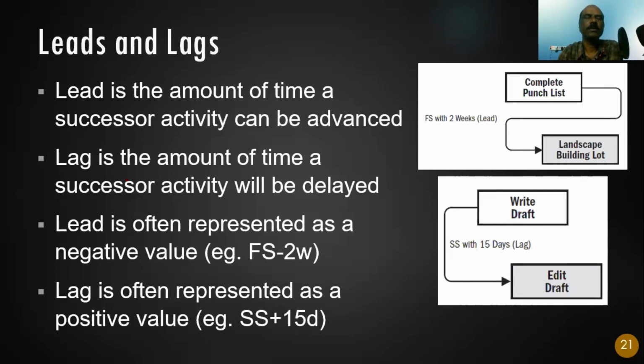That is lag. Sometimes I might say that finish construction, and from the finish of construction, I need 45 days to submit the as-built drawings. That is again lag, 45 days lag. Or maybe you might be doing a concrete slab, concrete is done, and then I want to wait for 14 days before I start any activity on top of it. That again is a lag, a waiting time of 14 days. So lag is very, very common in most of the projects.